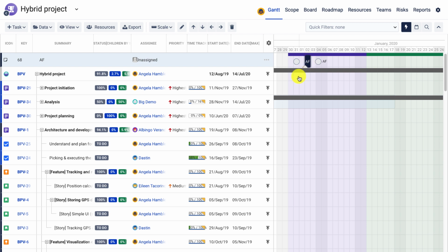In that case, you will end up with a list of issues starting on the current date. Today is the 2nd of January 2020, and the 1 day duration. So this is what would happen if no original estimate, no start and end dates are set. We will use the creation date, and the task will have a 1 day duration.